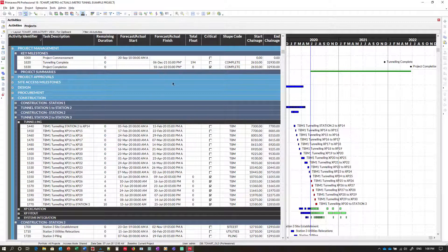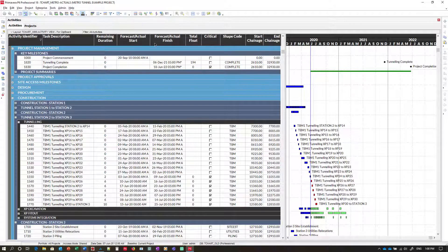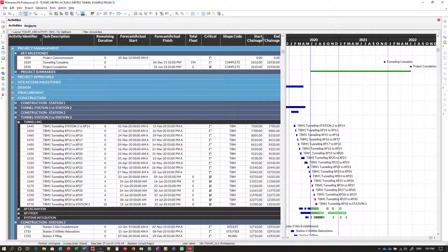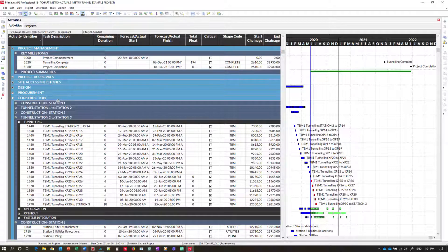So here we see our P6 activity data. We'll note the columns across the top that represent the required and preferred fields and also some extra additional columns as well. Note that the column names have been changed from the P6 default names. These can be mapped using the Paste Wizard in TurboChart later on. We also have additional columns of data that are not required in TurboChart but may be part of our normal working activity layout. And we also have grouping and sorting that can be any grouping or sorting fields that you may use.